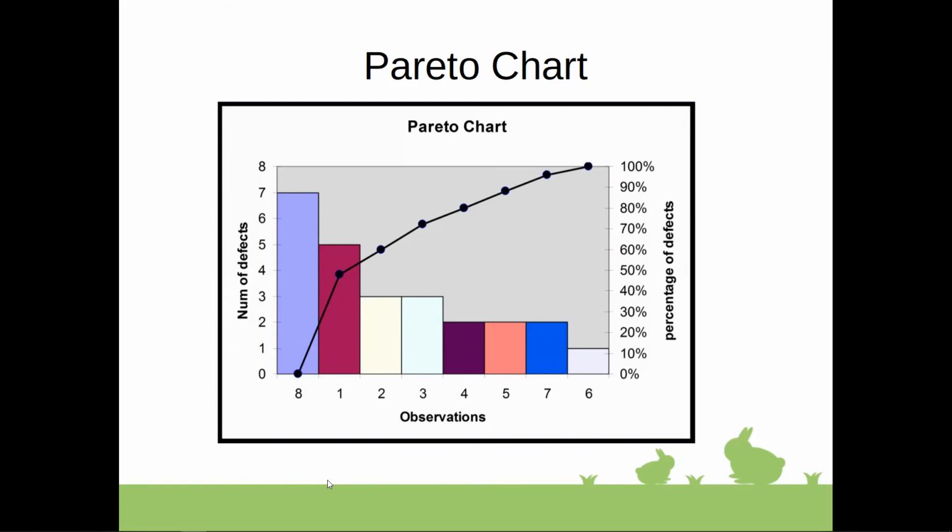Then you decide on a period of time that you want to cover within this Pareto chart. Alternatively, like in this example, you can decide on number of observations of each type, of each grouping. Then you collect the data and summarize subtotal for each group of the identified risks.